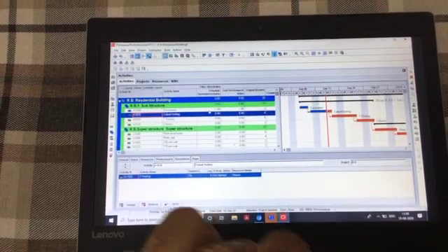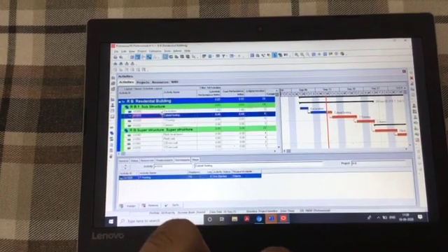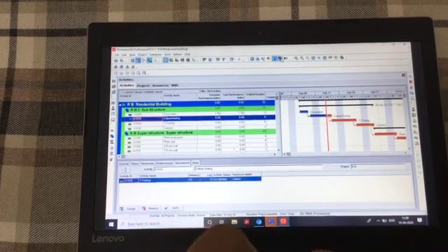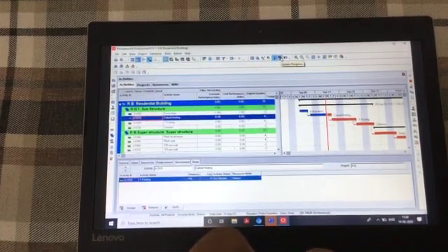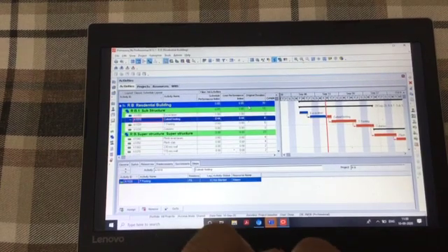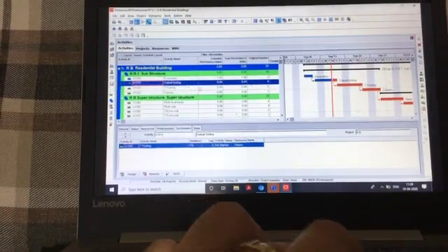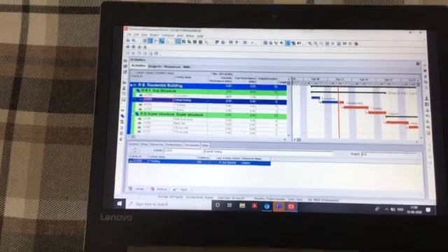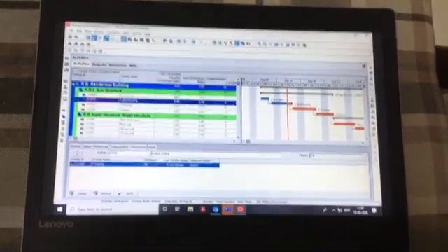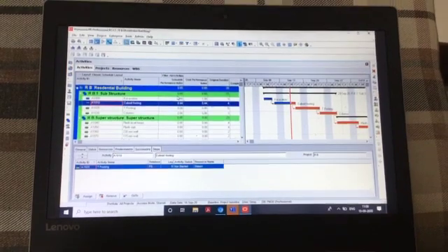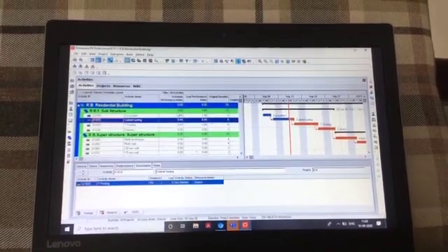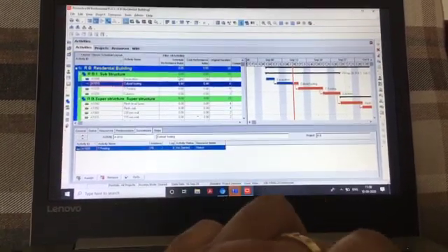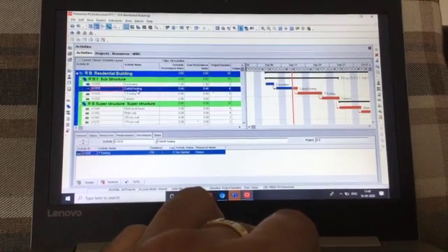So what have we done till now? We scheduled, and we updated the progress to see where we stand. If we look at the schedule performance index, it is 0.65, which is less than 1. Less than 1 means we are behind schedule. We are not working properly. Some of the things are not coming the way they should. Okay, that was the earned value management system.